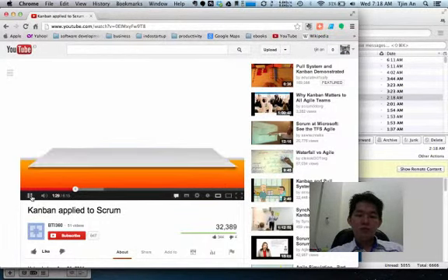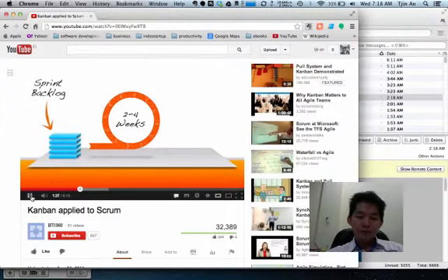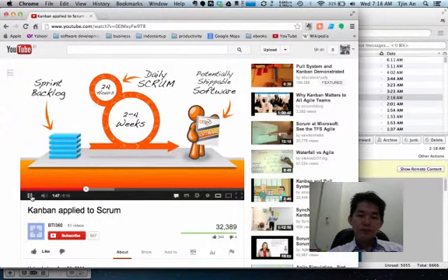The product owner prioritizes the work for each sprint, called the sprint backlog. The delivery team then plans and estimates this prioritized sprint backlog, and then begins the sprint. Throughout the sprint, a standing status meeting is held every day called the daily scrum. The delivery team continues this cycle until the sprint ends. Then the delivery team demos potentially shippable software to the product owner. So there you have it, Scrum in about 30 seconds.